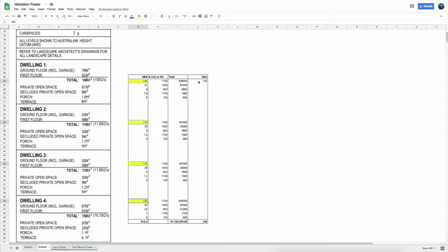Now this is different because I would not include the garage area in this. So in Melbourne, in my part of the world, or in Australia all over, it does not include the garage area. So I know that this is a 3-bedroom because it is a double garage, and you can tell by the living space. 140 square meters is typical of a 3-bedder, and 110 square meters is typical of a 2-bedroom townhouse. And then you've got 150, that is also a 3-bedder. So what I would do here is that if I've got 140, I'll just go 140 and a double garage in Melbourne. This is the kind of information that you need to find out for your country.